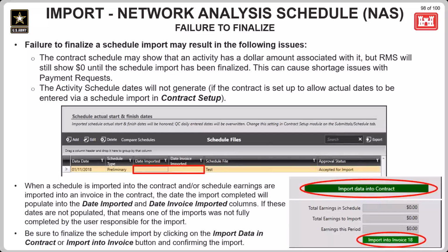And finally, after the approver has gone through and reviewed the import preview and everything looks good, or everything in red or invalid has been fixed or dealt with, then the import can move forward. Remember though, sometimes those red or invalid indicators could be intentional. Sometimes an activity can be deleted or the details on an activity can be updated. That'll just require close coordination and communication between the government approver and the scheduler or the contractor requesting acceptance to import the schedule.